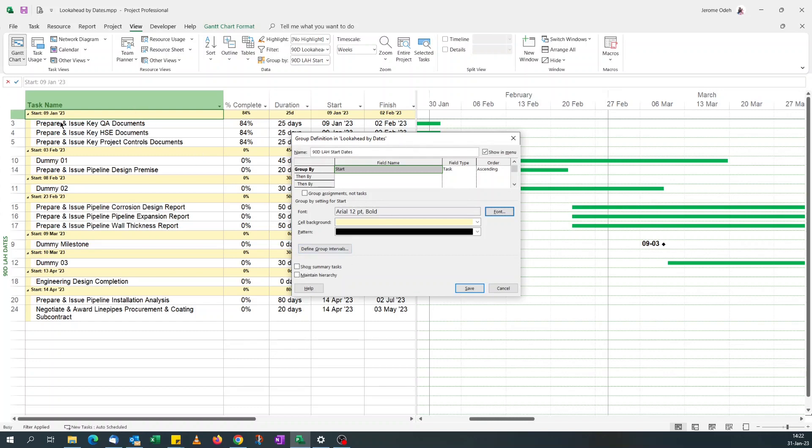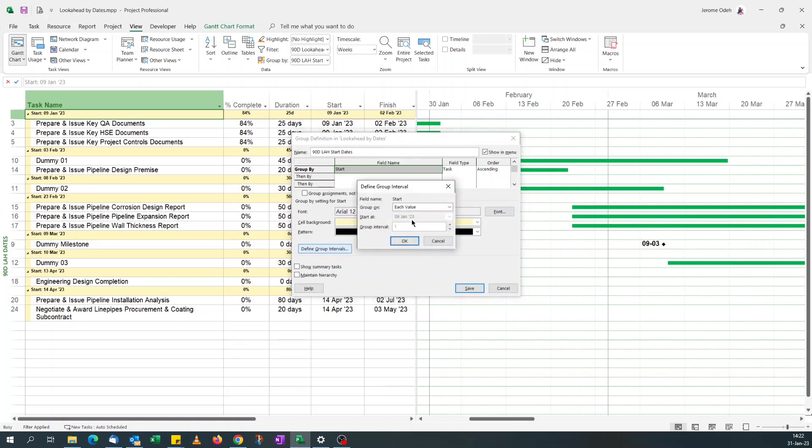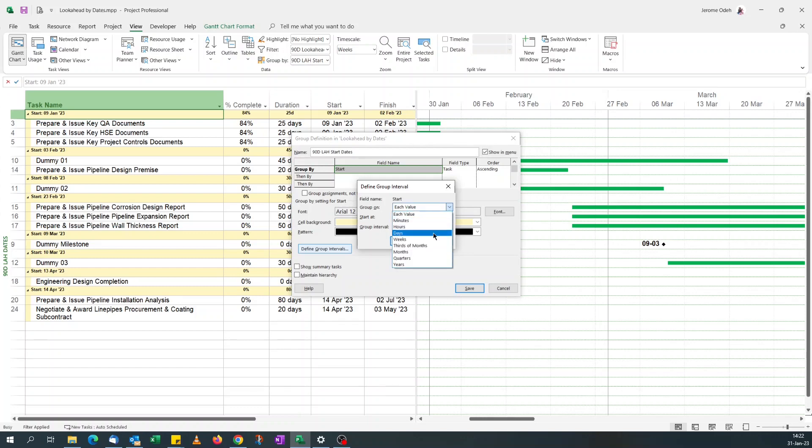I want the interval to group activities by weeks. Now it's just grouping them by start dates, by the exact date. Yeah, it's only by each value. But if you've got a two-week look ahead you can group by days.